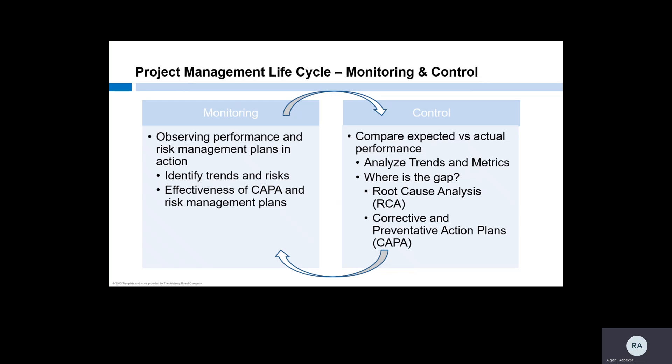The goal of control is to get a handle on our risks to quality, project performance, data integrity, and subject welfare. We look at the data we collected during monitoring and compare what actually happened against what we expected to happen. Are we performing better or worse than we expected? The difference is called a performance gap. Conduct a root cause analysis to identify what really caused the discrepancy. Once we've identified our root cause, we'll develop a plan to fix it and prevent it from happening again — a corrective and preventative action plan, or CAPA. Root cause analysis and CAPA are team sports. All of the study team members involved need to participate in the process to identify the core issue and develop the CAPA.